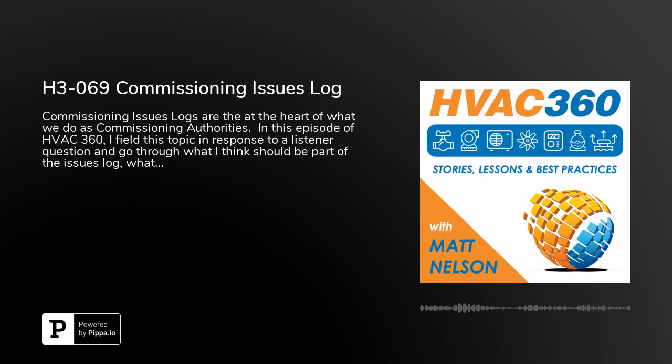The next column would be simply a date issued, when this was issued, and the next column would be by whom. Once you get past that, you want to identify who's responsible to respond, whether it's an engineer, the architect, the contractor, or sometimes even the owner. Sometimes there are specific issues that you want to get on your log where you're saying, here's an opportunity for betterment. It's not in the design, or during the design phase, you should really consider this. Maybe spending the extra money now is going to save quite a bit of money afterwards. So even the owner can have a chance to respond to this. That's who you identify in that column.